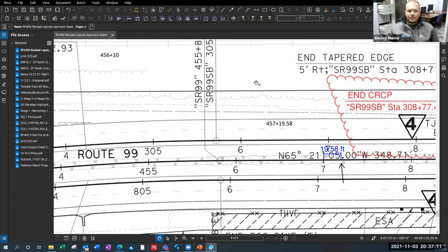And when you're, just an example, like if you're paving asphalt on an asphalt road or concrete, you have to bring all that material into you on dozens of trucks, right? It depends on how far away you are from the location of the plant. So you have to calculate, how many trucks do I need to bring this material in this 8-hour window without having too many trucks backed up, right? Where you're wasting money, or without having your crew waiting on trucks to pave asphalt. Because both of those, you lose money in both conditions. So that's just part of the bid process. You have to figure a loop time.